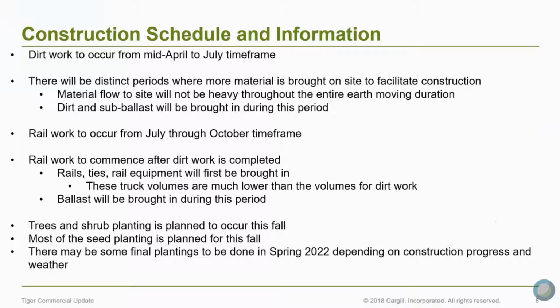The plan is we will begin working on the berm on the north side of the property as quickly as we can. The quicker that we can get visual and audible screening up there, the better off this will go. So we will be prioritizing that as we start hauling dirt.